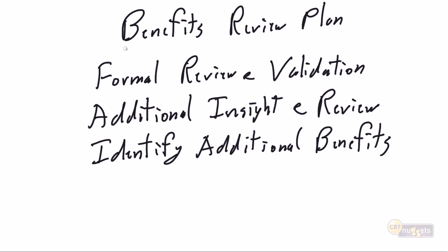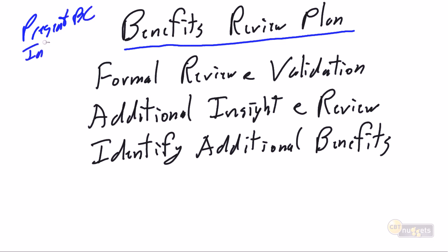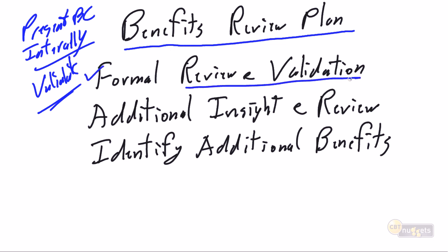So by now, our business case should be all but complete. I would suggest we need to do a business review plan where we're going to present the business case internally within the business and within our IT community to validate our approach so that we have an absolute squeaky clean business case before we present it to senior management for approval. So this is going to be a formal review and validation, peer review within the business area.